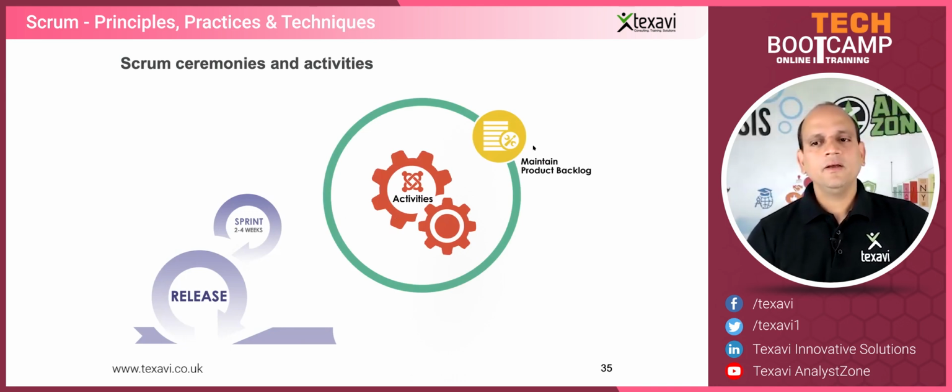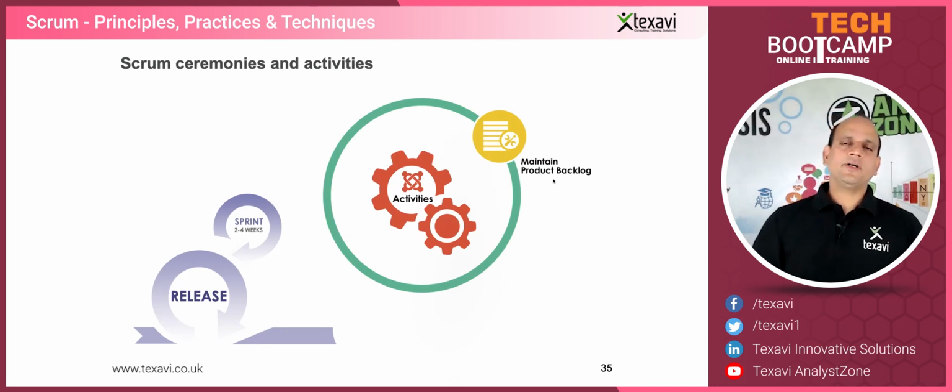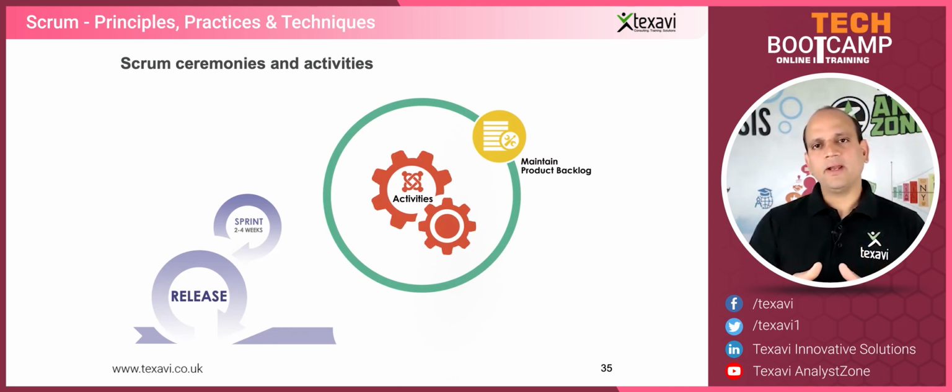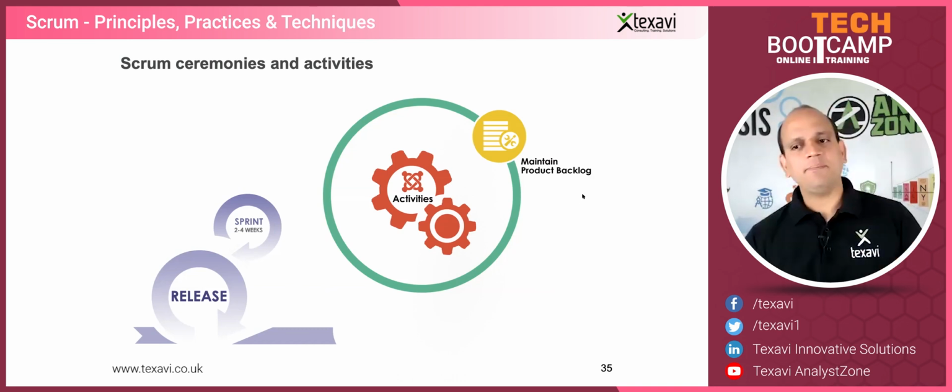So you've got what we call the product backlog maintenance. We talked about it extensively during the scoping and prioritization course last week, where we talked about how this product backlog gets groomed, refined, how the items get up from the bottom of the pile to the top as they get more and more detailed and more fine-grained. So all of that happens during the product backlog maintenance.